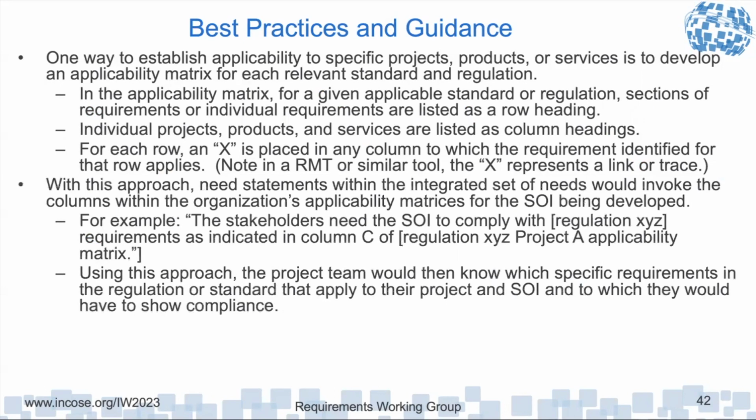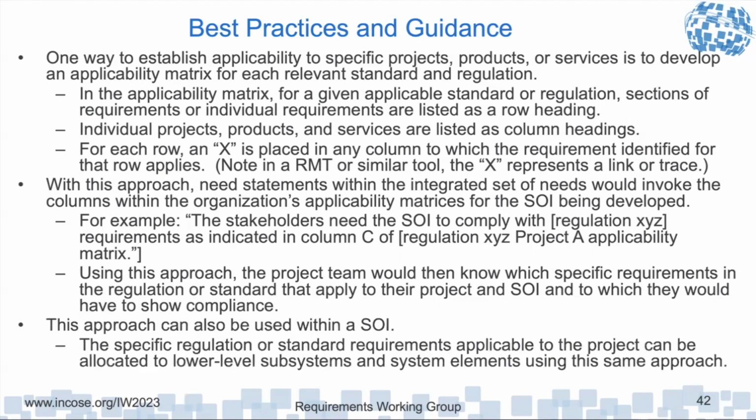For example, the stakeholders need the system of interest to comply with regulation XYZ requirements as indicated in column C of regulation XYZ for project A. Using this approach, the project team would then know which specific requirements apply to their project. And this can also be used within the system of interest to further show applicability to subsystems and system elements